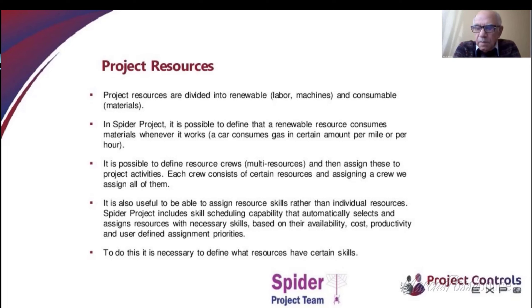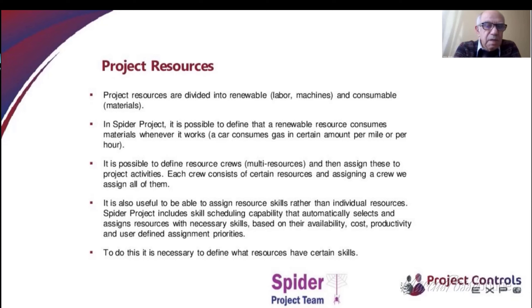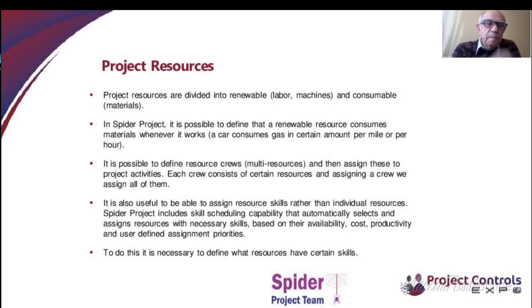Another option in resource planning is assigning skills instead of specific resources. You can create a list of resources that have certain skills, assign those skills to activities, and when Spider Project calculates the schedule it will select which resource does what, based on resource skills, availability, productivity, and cost. We call this skill scheduling. Another option is to create and assign resource crews, which we call multi-resources. When you assign a resource crew, you automatically assign all resources belonging to that crew.